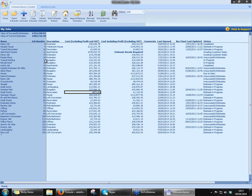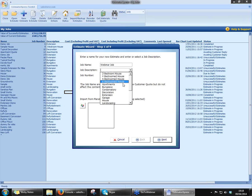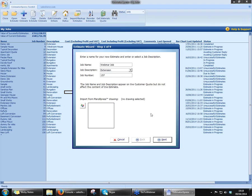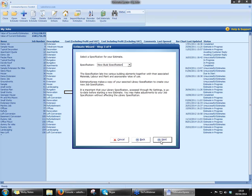So just moving on then, we'll go to New Estimate — and again, that's at the top left. Give the job a name — I'm going to call it Webinar Job. Job description: today we're doing a simple extension. You can change your job number if you want to. Click on Next. Working from the master price book. You can actually set yourself up regional price books — say for instance you're based in Birmingham but you've got a big job in London. You're going to be buying your materials in London, which are going to be much higher. So you can add maybe a 10% increase on all your materials and then use your London price book to price the job.